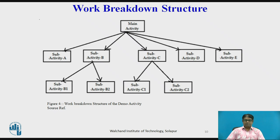The main activity is composed of activities A, B, C, D, and E respectively. Activity B is decomposed into sub-activities B1 and B2, and activity C is decomposed into sub-activities C1 and C2, as shown in the diagram. The WBS helps the project manager to monitor the overall project.